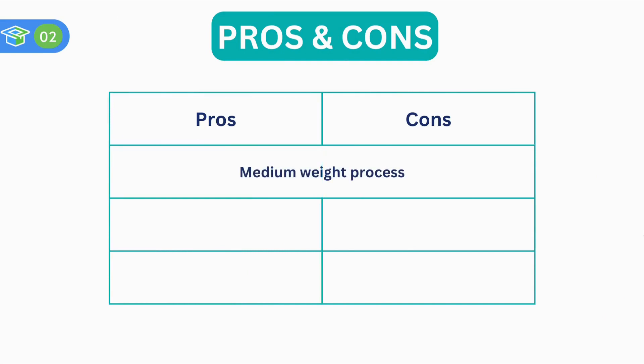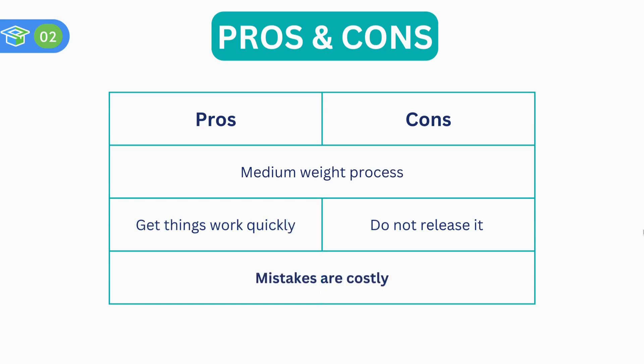Iterative Refinement is neither a heavyweight nor a lightweight methodology. It is a general principle that can be applied to different methods, so it is called a medium-weight process. Iterative Refinement can fix a problem or create something new quickly, but that process will not be released since it has to follow up steps of iterations. Furthermore, mistakes made in the requirements step are the most expensive and costly to the company and the development team.